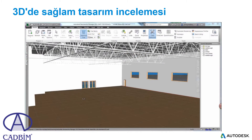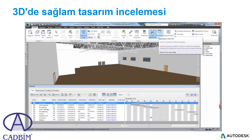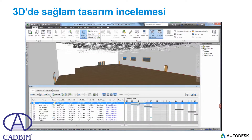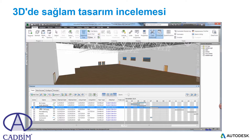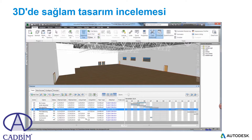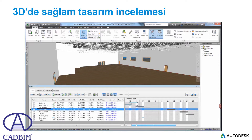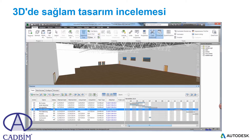Autodesk Factory Design Suite delivers tools for factory planning in Navisworks — a unique application for installation and sequencing, 3D walkthroughs, as well as clash detection. The Timeliner provides technology for the construction and demolition of factory equipment for new projects as well as changes made to existing designs. The data can be entered into Navisworks or even imported from other planning software such as Microsoft Project or Primavera.